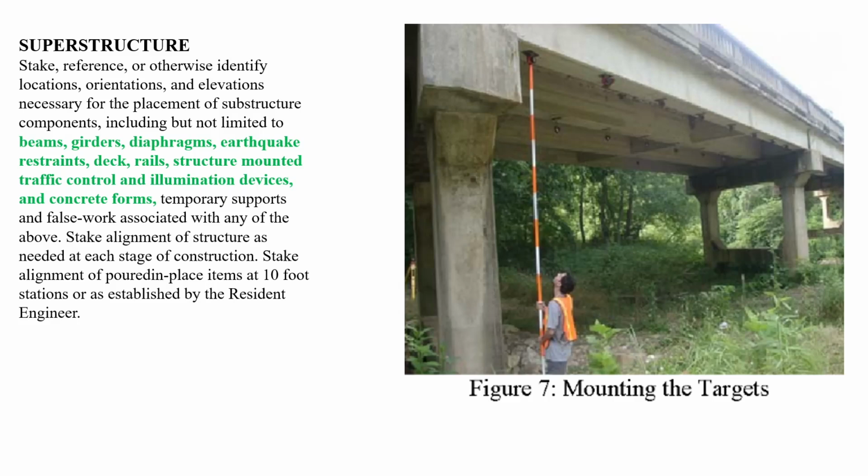Stake alignment of structure as needed at each stage of construction. Stake alignment of boarding place items at 10-foot stations or as established by the resident engineer.